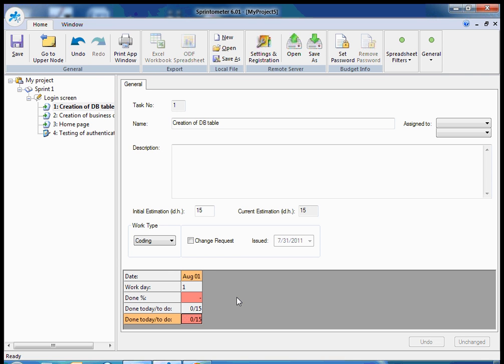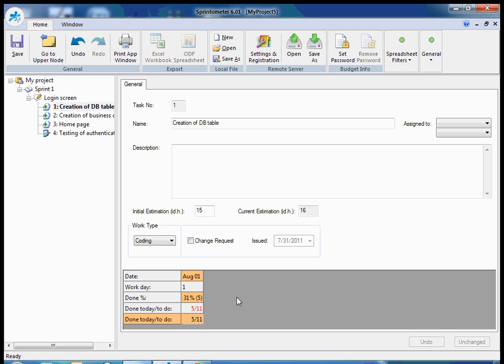And typical for Scrum, I report, for example, I spent 5 ideal hours on this task and I still have 11 ideal hours left. And you see, after apply, current estimation is changed. Because originally it was 15, but because I just reported that I spent 5 ideal hours and 11 is still left to do, the current estimation is 16.